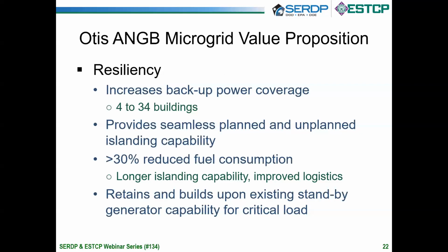And then one of the things that we started with the installation was that we don't want to have the microgrid replace the standby generators as the source of backup power. So we want to maintain the standby generators, and in the case of the generator we're using to power the microgrid, we want to retain its functionality as a standby for that particular connected load, but also be able to use it to support the microgrid. So if the microgrid were to go down for some reason, they still have the backup power capability they have today. Go ahead, next slide.